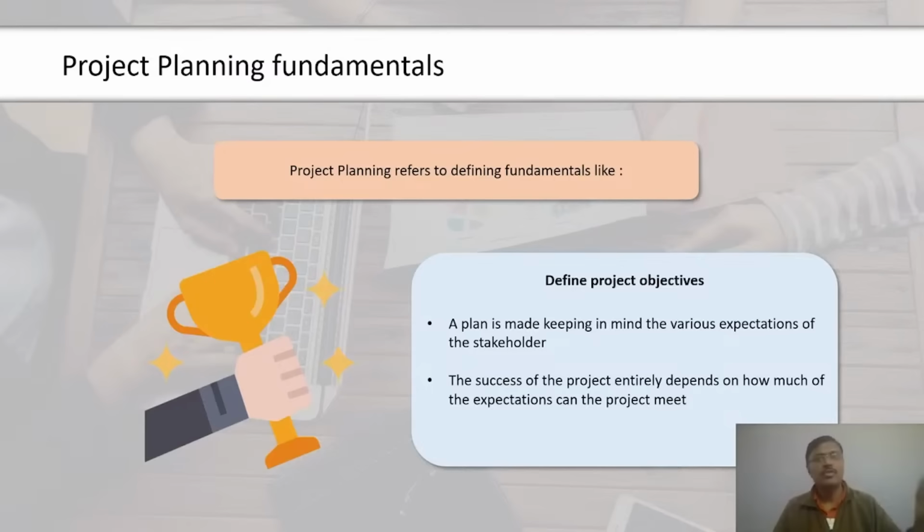The next step we have is converting this bar graph into a Gantt chart. So we will click on the bars and select the format data series option from the menu that appears. Here, we have this format data series option. Now we can see the dialog box on this screen. Here, we'll go into the color section, fill section, and then we will select no fill. Now we can see the blue lines have disappeared. So this looks like a Gantt chart.